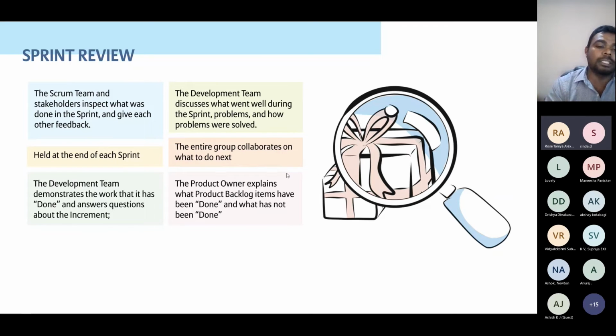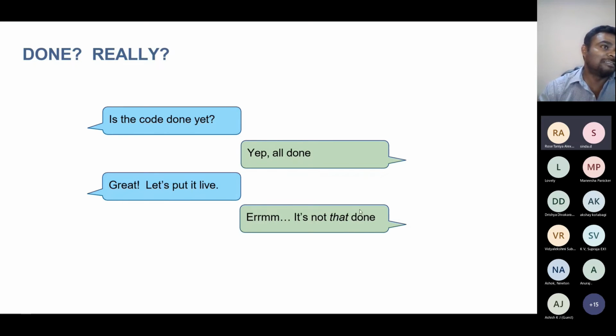Oh, we have done the testing, we have done the integration testing, we have covered all the scenarios, we have covered unit tests. It's fully functional now. So that means it's done. If any of those cases are not done, then that means it's not done. Okay, it's not done because we haven't covered the unit test cases. Some of the scenarios are not covered, but the developers say that I have done all the code and it will be working. But as a tester, we have to ensure, okay, this is done, but I have a few more scenarios to test. We can't take it to production.